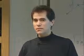So a lot of times it's not cut and dry, it's a guessing game, it's a balance, it's based on judgment, past performance, and a lot of other factors to say, boy, that's such a low probability of occurrence that I'm not going to worry about it. And that threshold is never defined. You have to define it as a project manager.